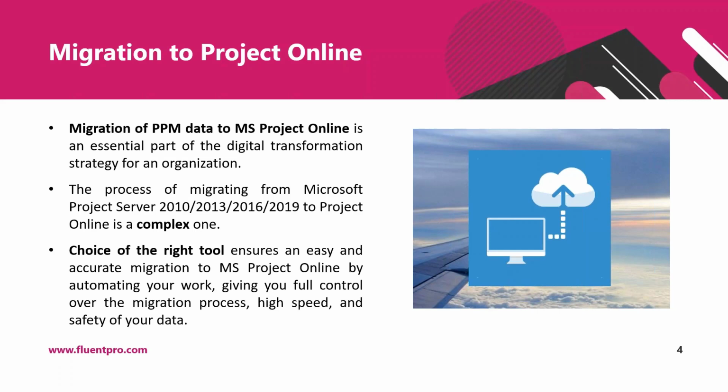PPM data migration to Project Online in most cases requires engaging third-party tools. Only if you have a small, not customized environment, you might opt to configure target PWA manually, then save source project plans and templates to the MPP and MPT files, and then publish them to your target PWA. But it is definitely not an option for bigger environments.